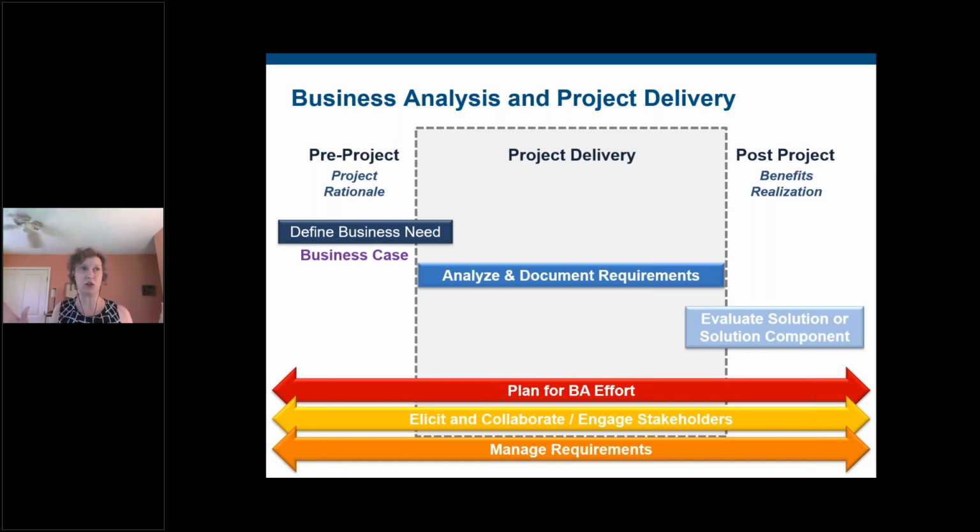Business analysts are all about that. That is a huge piece of what they do. Looking at, did we realize the benefits that we were expecting to get? That is hard coded into BA work. That's just part of their DNA, doing that post-project work. So sometimes after a project is closed and the PM is on to other things, that BA is still hanging around 3, 6, 9, 12 months later, looking at, okay, what do the metrics say?